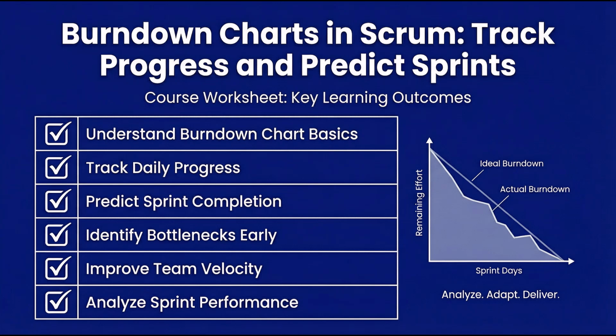2. Weekly diagnostic, 5 minutes. In your mid-sprint check-in, ask the diagnostic questions for your current pattern. Record the answers. 3. Action planning, retrospective. Use the action framework section to plan and track corrective actions. 4. Pattern tracking. Keep a log of patterns over multiple sprints. You'll start to see trends, and that's when real improvement happens.